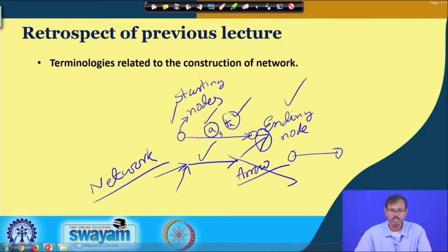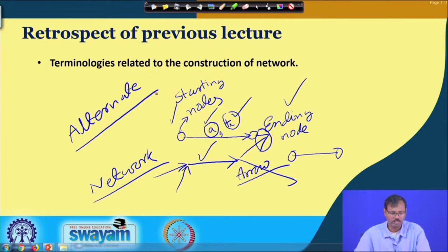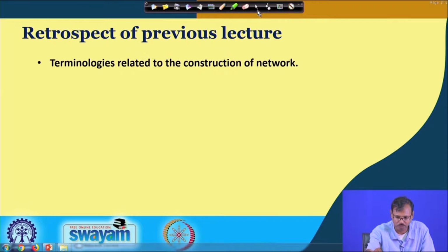Anytime you are representing a job in an arrow diagram, the arrow must be there. A line cannot be accepted in the arrow diagram or in the network as representative of a job. There are other ways to define a job in this network analysis or graph, in terms of alternates also. So, let us continue with how we will start the network.